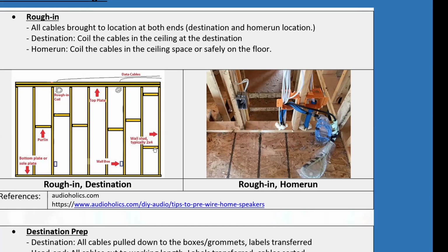And all the time and effort that you have put into this site is going to be wasted, because nobody's going to get paid. Nobody will pay you if the general contractor is out of business, legally bankrupt. That's it. They're out of business. So you're going to be stuck with all the bills that you paid for the wires, maybe possibly some device boxes and whatnot. And if you hire people, then you still have to pay them, right? So doing the jobs in stages helps you with covering some of the losses if something bad happens.